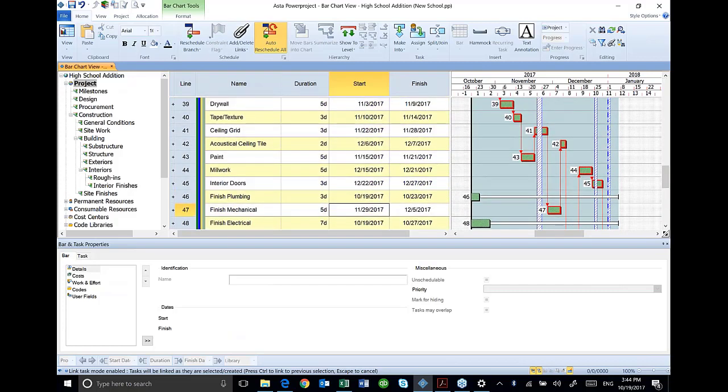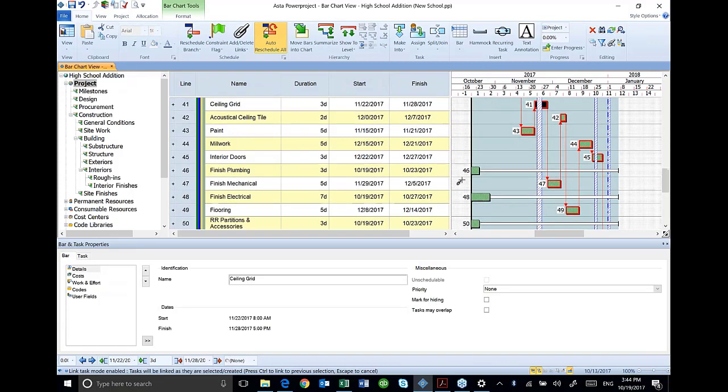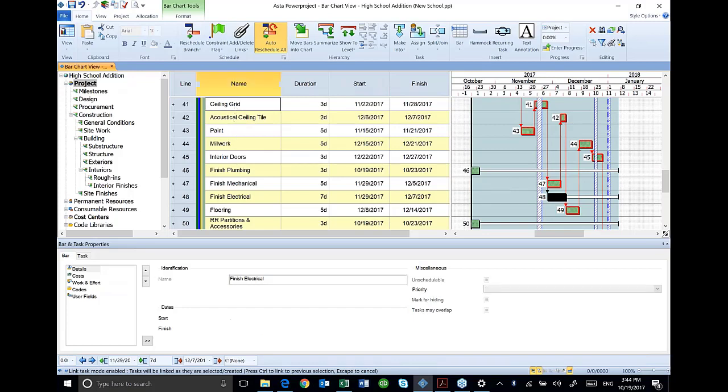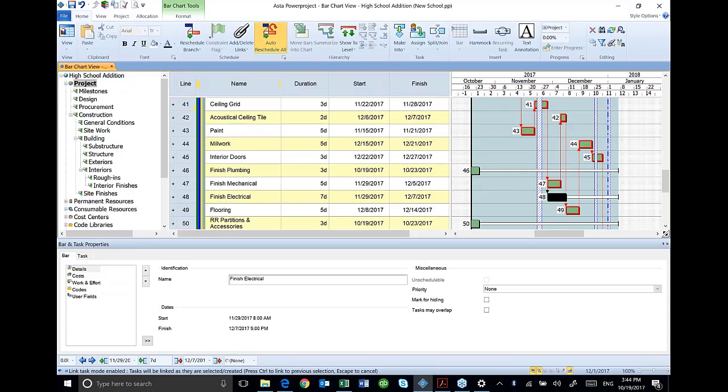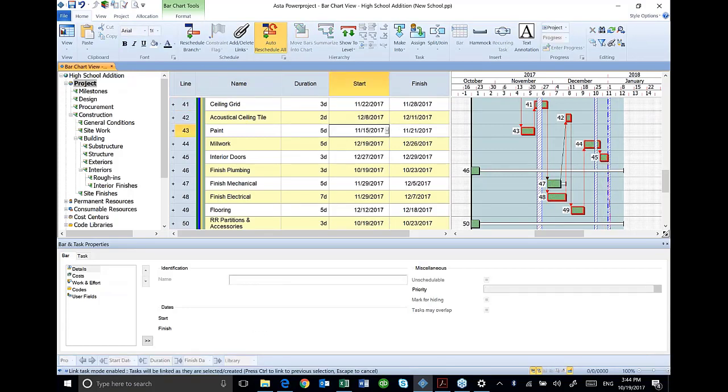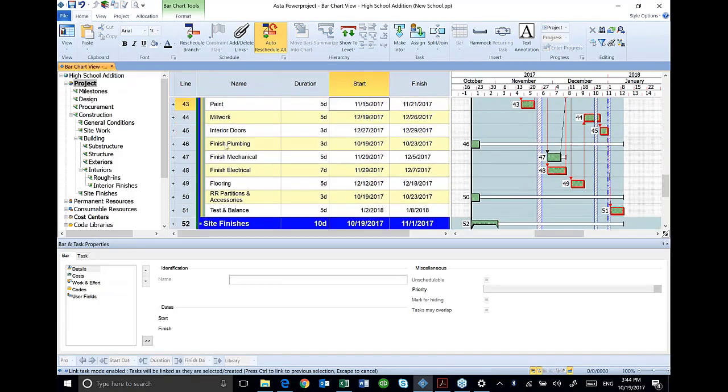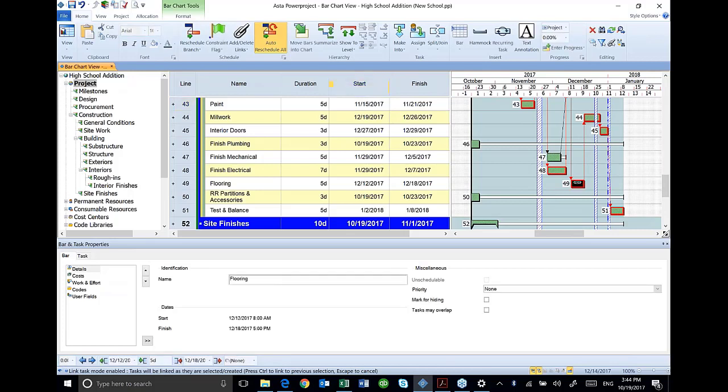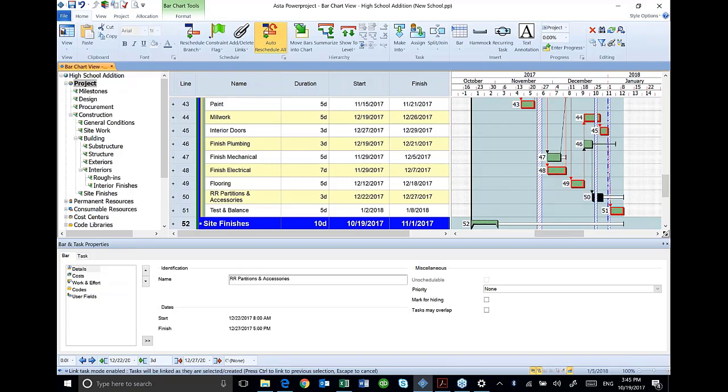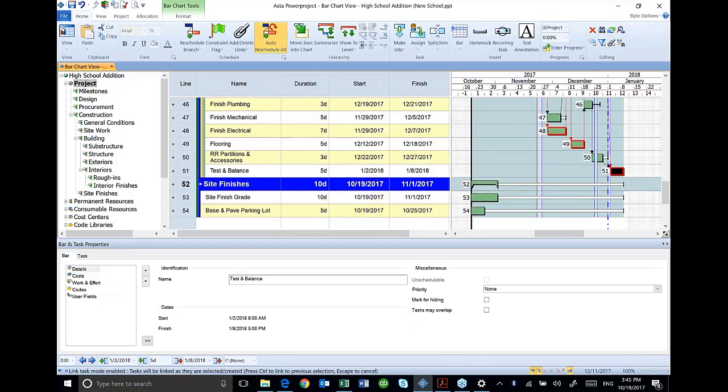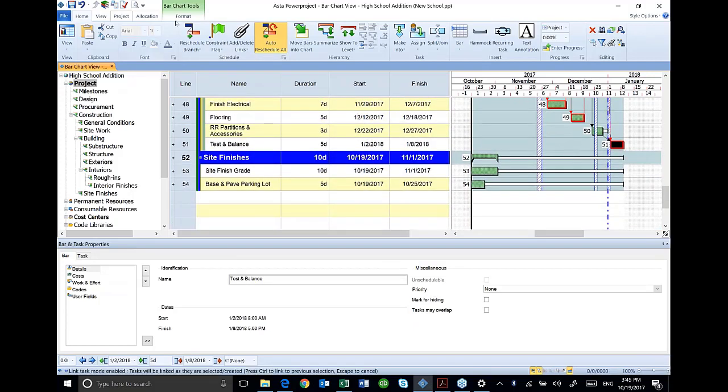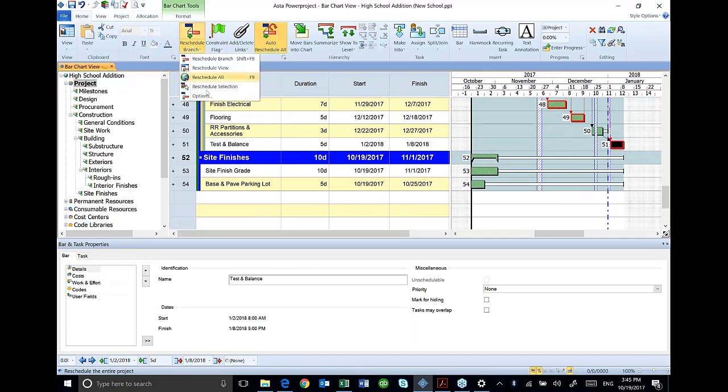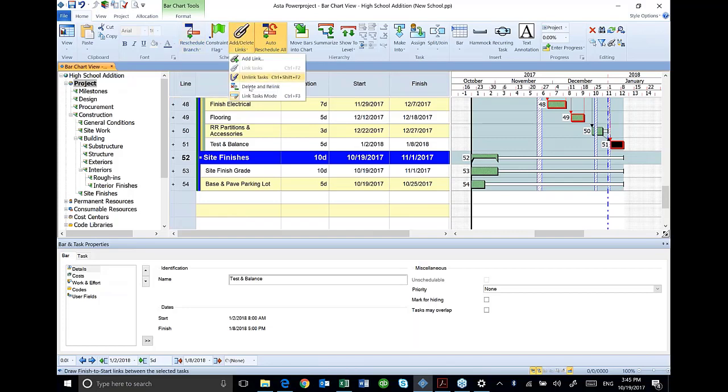So with my ceiling grid, I'm going to highlight that one. I'll do my finish electrical. I'll do my finish electrical and my ceiling tile. So basically, I just finish electrical. I'm going to tie that into my ceiling tile. I'm going to unselect, come over here, unselect it so I can get these restroom things in. Once I get my flooring in, I'll do my finish plumbing, restroom partitions, and then test and balance. And that's how you tie those in. Easy enough. And then I go back up here and I turn that option. I turn my link task mode off.